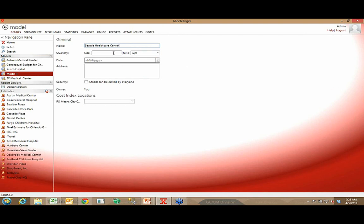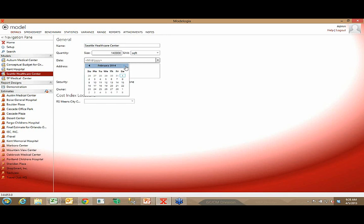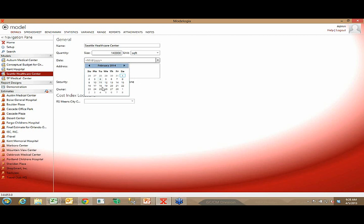I could go in and we said we're thinking it's going to be roughly 140,000 square feet. Now the date, the date's very important here because I'm going to normalize those projects to the date of my proposed project. And that proposed, the date that I put in here might be the date that I think we would break ground on that project. It might be the midway point of the project. It's whatever I want to normalize those three projects to.